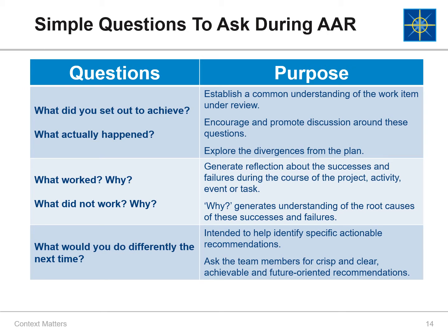Some questions to ask in an AAR are, what did you set out to achieve? And what actually happened? These questions establish a common understanding of the work item under review and encourage and promote discussion around these questions. Other questions to ask are, what worked for you and why?